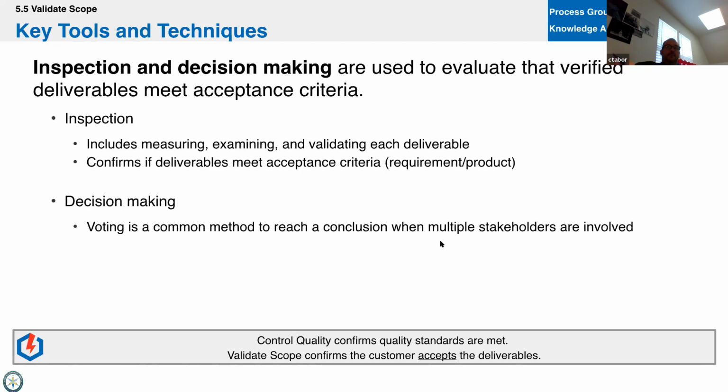Pretty much, because any changes to that schedule that you can't, as a PM, adhere to, you would go through change control and they would say yay or nay, right? So it's only the final product that they can validate. So we verify, customers validate. That is going to come up on the exam a ton.